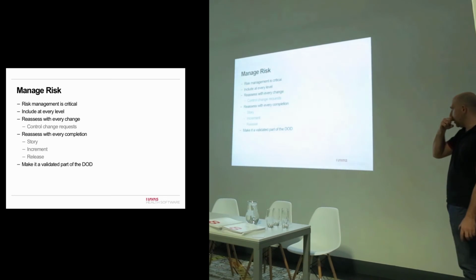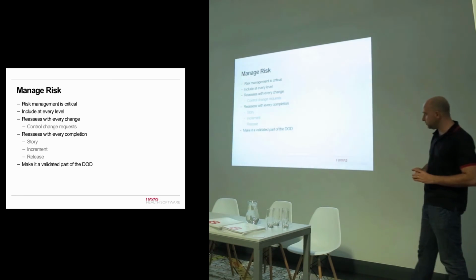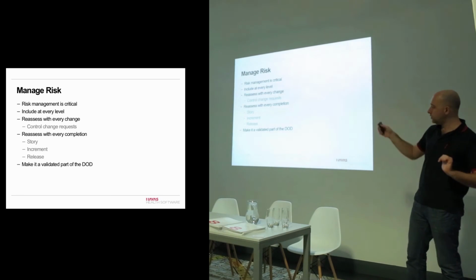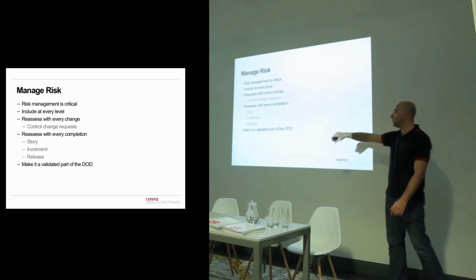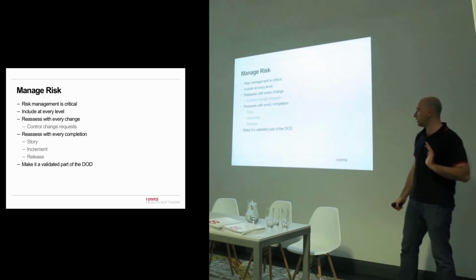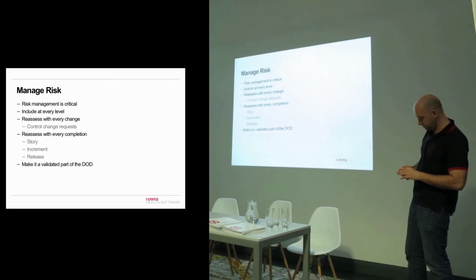How risky is this? When you finish an increment, so if you finish a sprint or an iteration, risk assess again. Okay, have we introduced any further risk? And right at the end, at the release point, just cover off all your risks. Have we been through every risk? Are we introducing further risks? Does everything check the boxes?